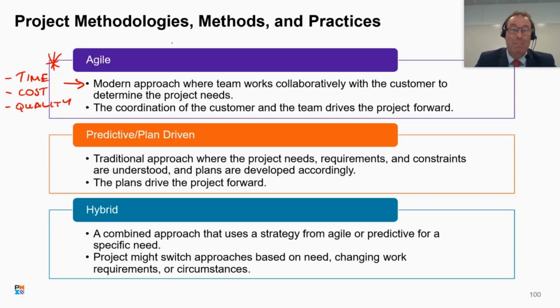Now remember, we use the prioritization technique, Moscow. So what we would do first is we would look at all of the features which are could-haves and say to ourselves, well, we could deliver these, but they're not necessary. The only thing that's necessary in an Agile project environment are the minimum usable subset products, which are known as the must-haves. These are the minimum viable products or the minimum viable services.